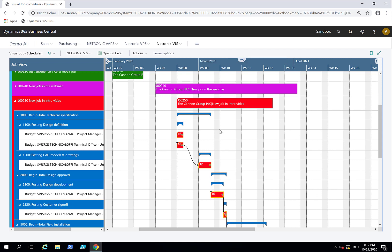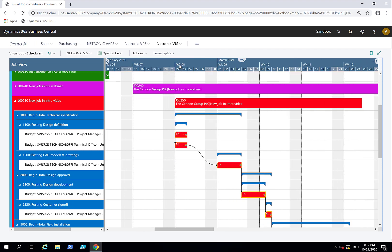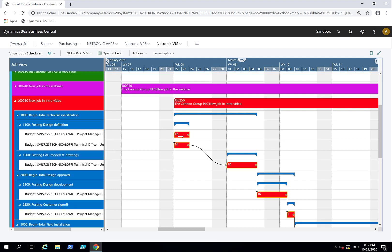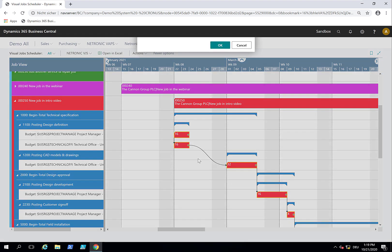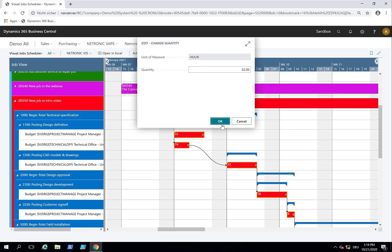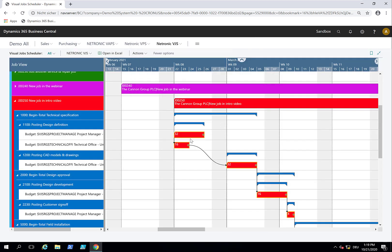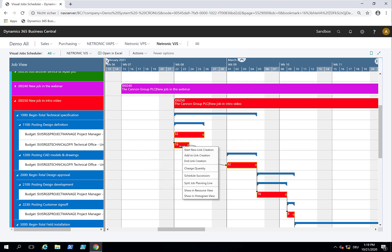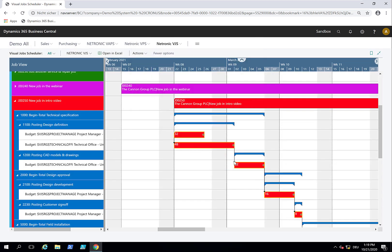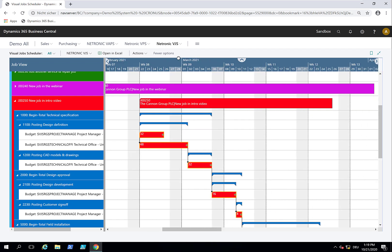For the first task here, this will be a complex job. It will not take 16 hours, which is two days, but we need one project manager for a longer time. I want to change the quantity from two days to four days. You see this got longer. We also need more experience in the technical office. I change the quantity here to 48 hours, so it will be six days. You see the immediate impact because I defined these links already, and you see these effects taking place.